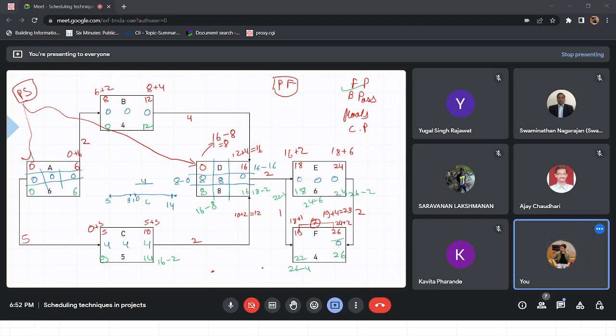So anyway, if you want to move it, you can move the start date by 4 days, and it won't affect your duration, I mean complete project, right? Yeah. And similarly, if you move its end date also by 4 days, it won't affect your duration. Yeah, and the total float is also 4. So what this shows you is that the total float to play with is 4 days only. Either you use it at the start or finish, right?